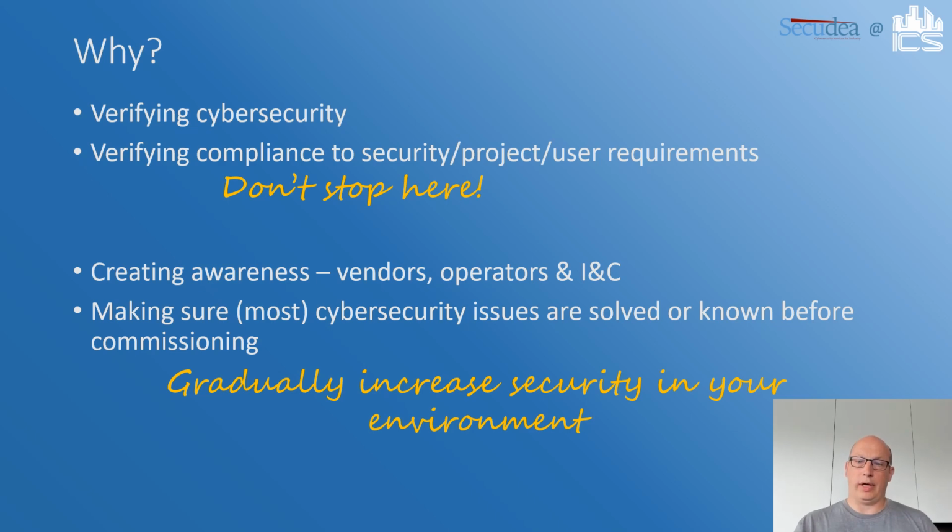Why would you ever do cybersecurity testing within ICS environments? First of all, as I said already, verifying cybersecurity. Second one is verifying compliance to cybersecurity or project or user requirements. But you should not stop there, because by doing testing, you also at the same time create awareness with your vendors, operators, with INC people, and you are making sure that most cybersecurity issues are known and are candidates to be solved before you go into commissioning.